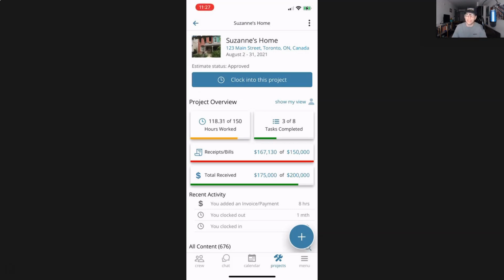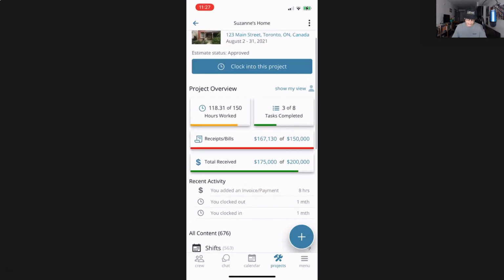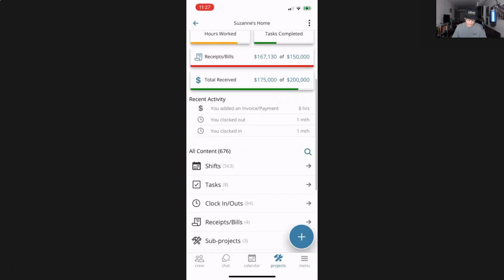The pointer level is supposed to give you a bird's eye view of all the projects that you're working on in relation to the budget. And if you see a massive variance somewhere in one of your jobs, that's an indicator that you should dive into that job and see what went wrong in it, right? You've got to be efficient about your time. You can't analyze every single job. You need to know the job. You need a way to filter out the good from the bad, and Level really helps you with that process by giving you a bird's eye view of all the projects that you've worked on and the job costs associated with that, right?